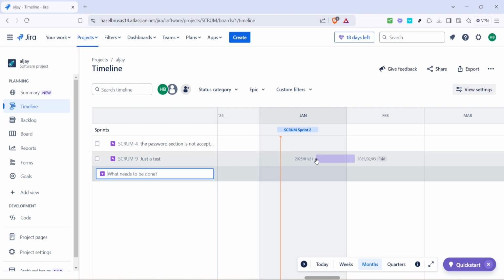As you continue planning your project, you'll need to set start and end dates for your epic. Visualizing these dates on the timeline is straightforward and highly interactive. Move your mouse pointer over the empty cells within the timeline view. These cells correspond to dates and durations. By clicking and dragging across the cells, you can select the specific dates you want your epic to begin and end. Setting these timelines helps ensure that everyone involved is aligned on the intended schedule and project milestones.